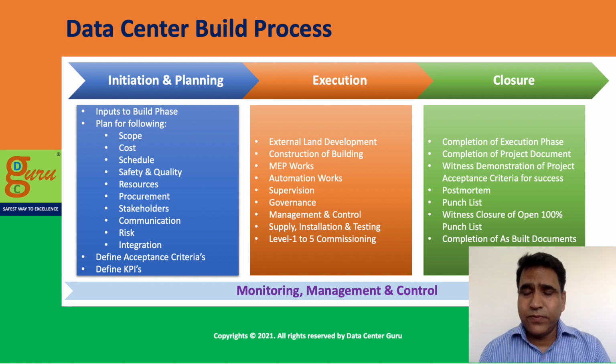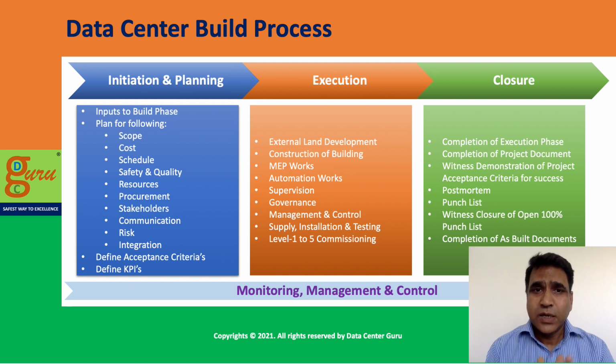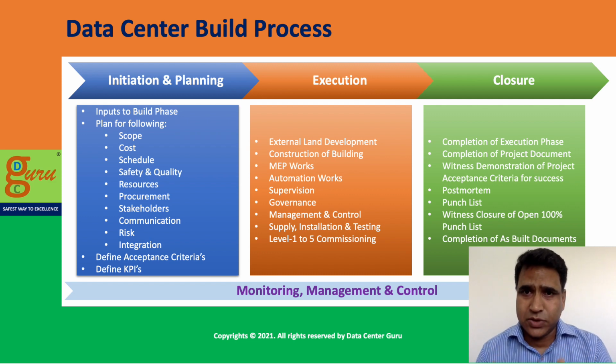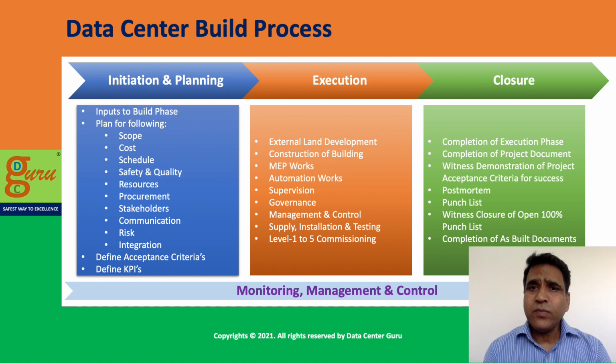So in the closure phase, what we expect to do is obviously the physical completion of your execution phase, then completion of the project documents. Whatever documentation is required for the project and operations has to be prepared. Then witness the demonstration of the project acceptance criteria which you defined in the beginning.